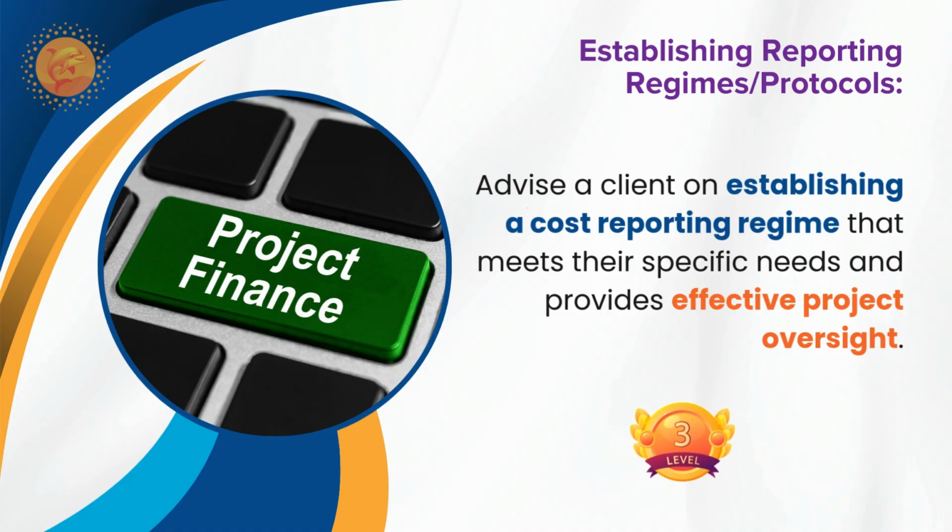We have to inform the client that we will have a separate change management procedure tracker, and that should be submitted to them, along with a cost report and a cash flow. So these are the main reporting regimes for them. Okay. So why do we need that? What specific needs and effective project oversight does it provide? What sort of oversight is it going to bring?